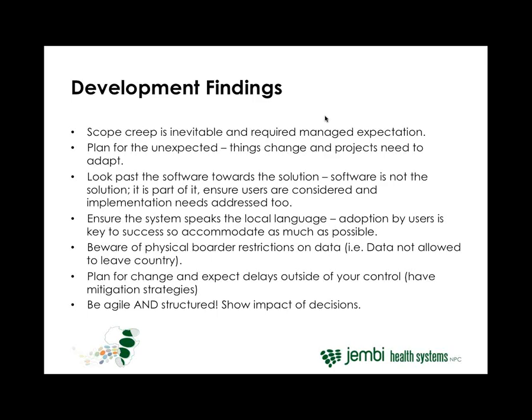So scope creep is inevitable in IT, as well as some design change coming through it, but that does need to be managed. That is something that Jembi is actively working on from the lessons of the past. Planning for the unexpected seems to be a little counterintuitive, but many times you don't know what you don't know, and you need to make sure that in your resource allocation towards implementing and rolling these projects out, time is allocated towards the unexpected.